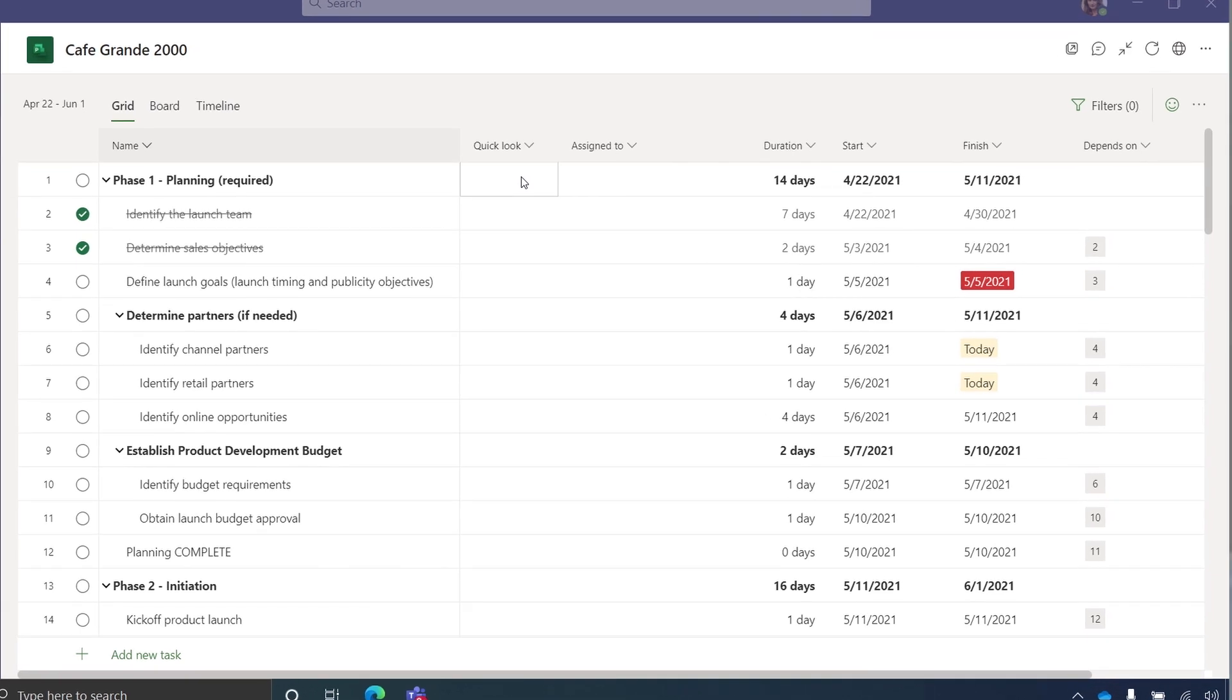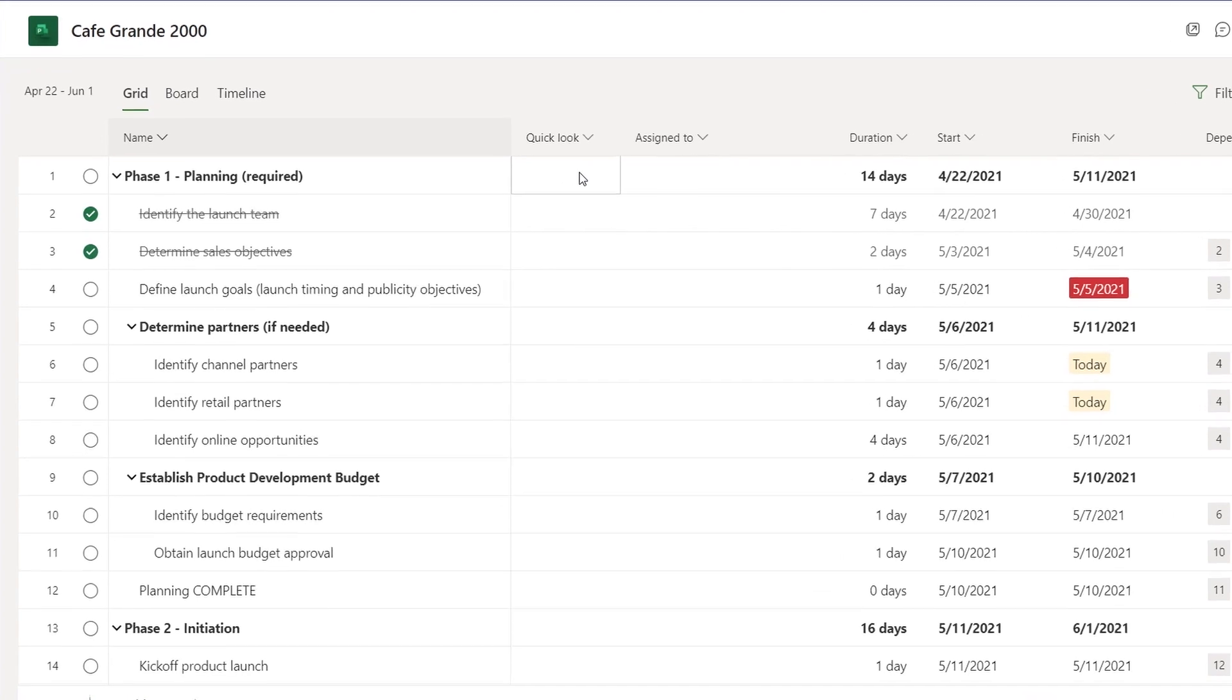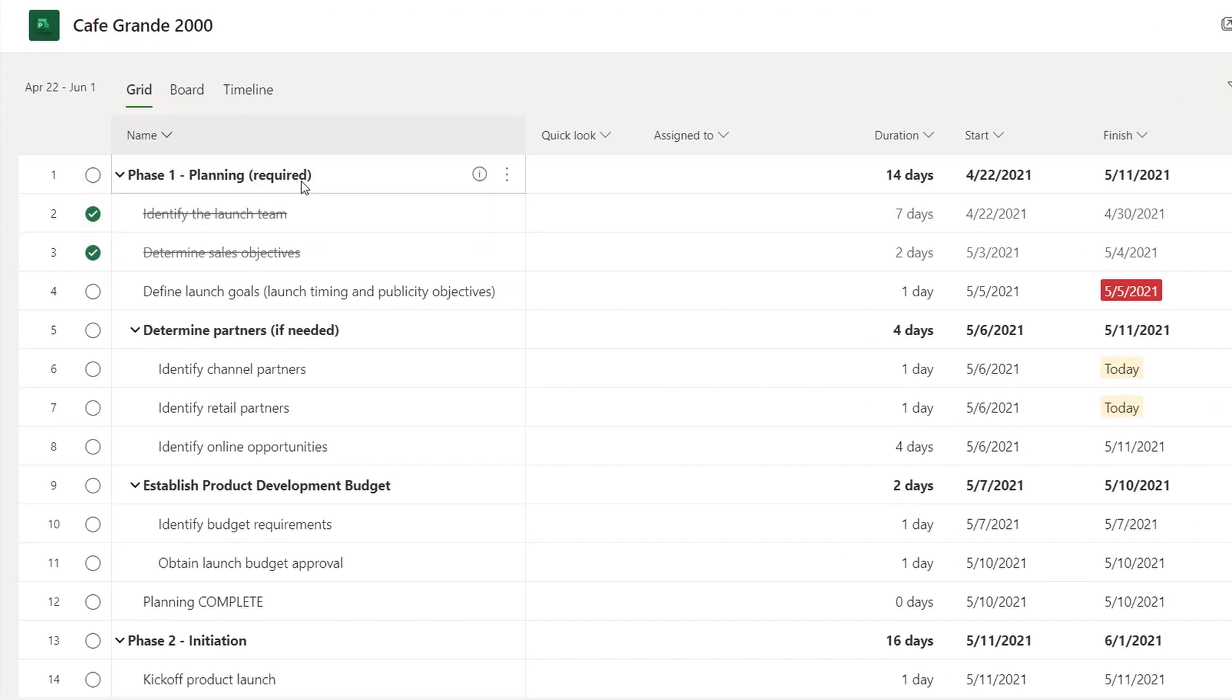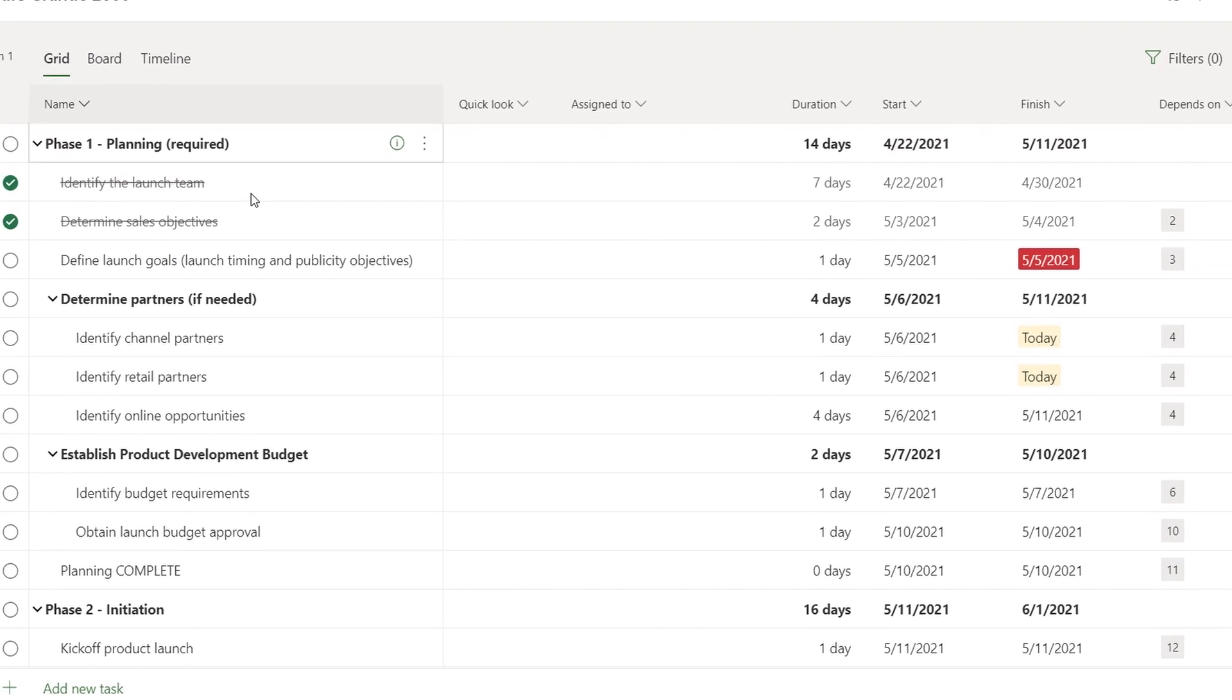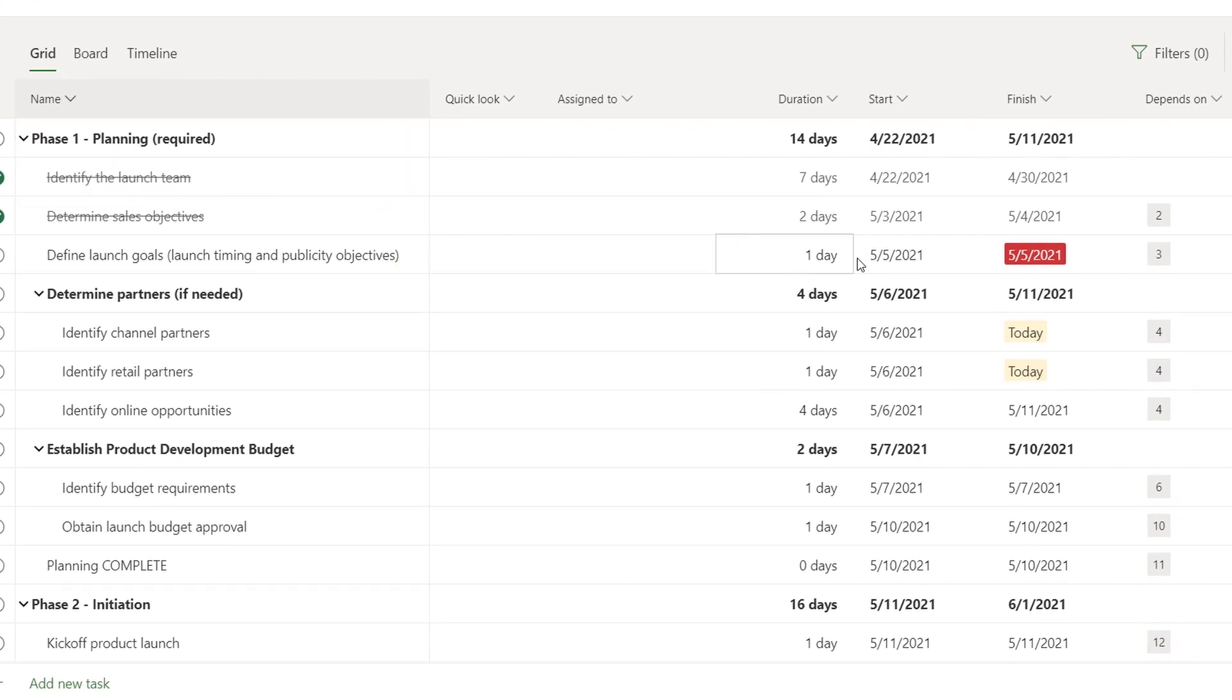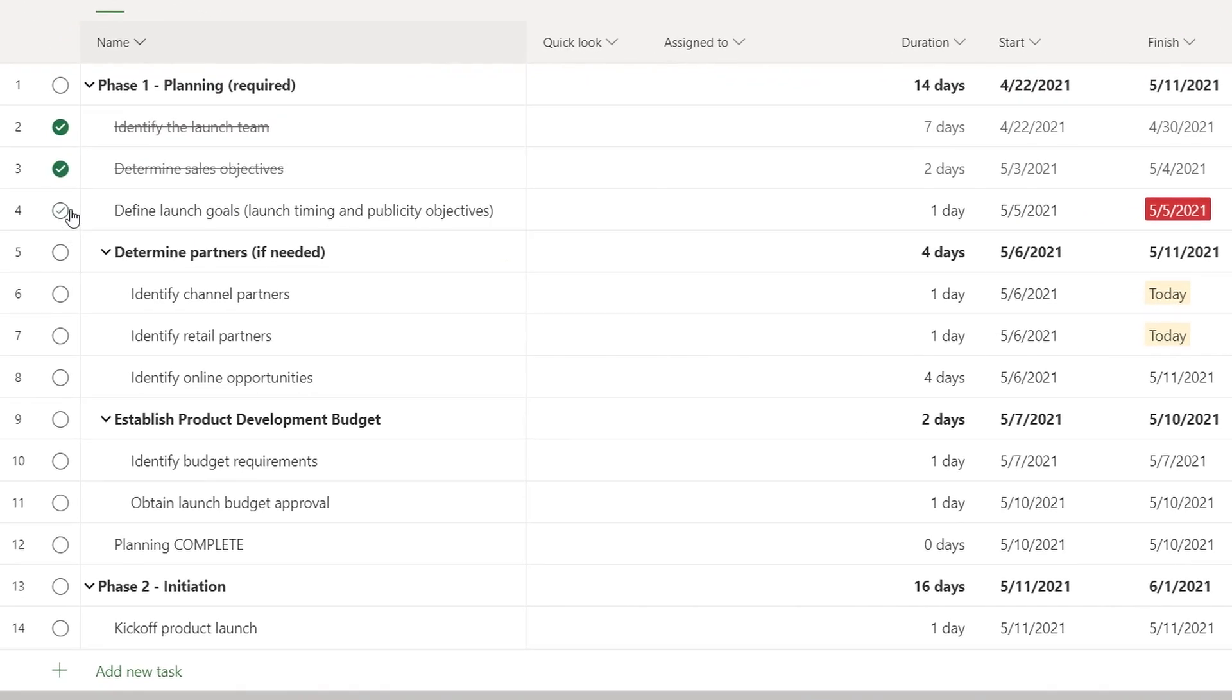This one's further along. So you can easily see completed tasks with green checkmarks and strikethrough text. The tasks that are behind schedule are highlighted in red and tasks due tomorrow are highlighted in beige. So I'll mark a few of these tasks complete.